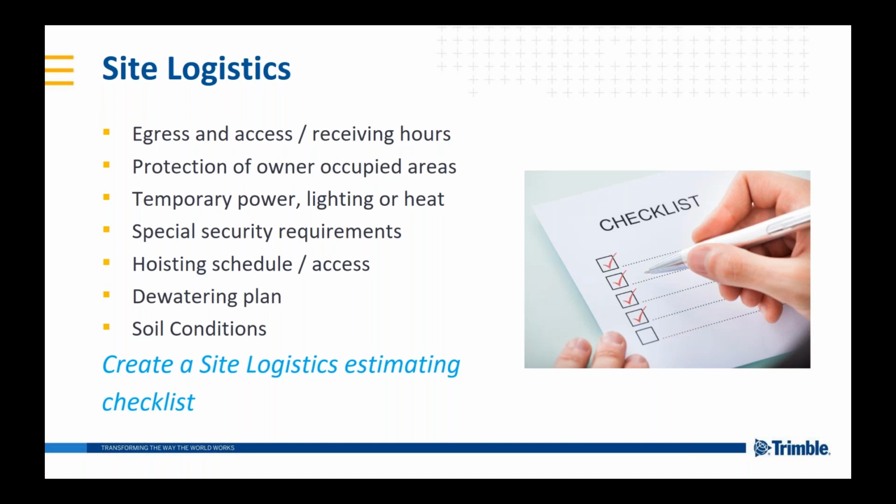You need to know if there's a buck hoist or an aerial lift, what the schedule for that lift is and what kind of access you're going to have to that. Who's responsible for the dewatering plan or subsurface conditions as we're on the job site? Big factors that can affect your productivity. If you're told that the GC is going to take care of the dewatering or somebody else, and you come in and the hole's full of water, it's going to be a problem.